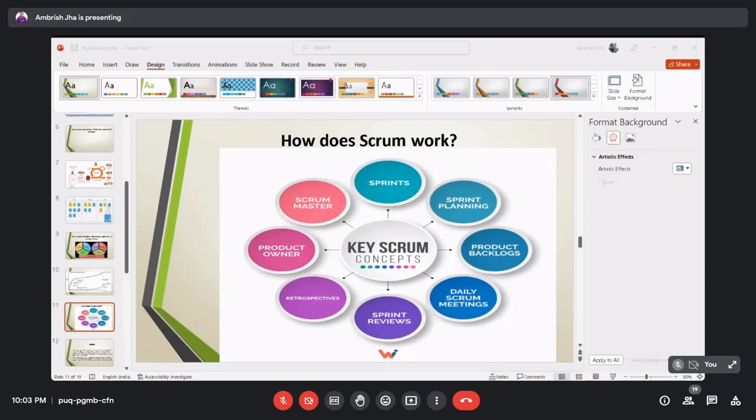Then we are doing sprint planning. So during the sprint time only, we are planning for the next sprint also. So for one sprint time, in 2 weeks time, we will dedicate at least 1 hour to do the planning of the upcoming sprint. And it is usually held at least 2-3 days before the end of the current sprint. Then product logs or product backlogs. So this is the responsibility of the product owner and business analyst who fills this form, or who fills this task list.